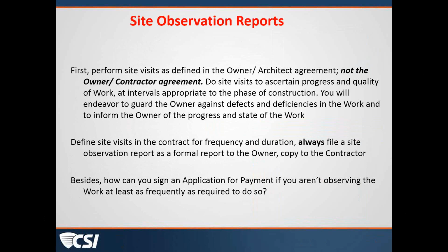We're supposed to ascertain progress, quality of the work. We're supposed to be there at intervals that are appropriate to the phase of construction. And we'll do those visits based on that phasing and not based on what is a convenient schedule for us. We'll endeavor to guard the owner against defects and deficiencies, and we'll keep them informed of the progress of the work and the state of the work.